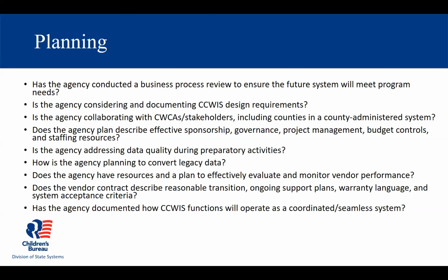You may, after reviewing the questions, decide you need to focus or prioritize or address only several of them. You may decide that you want to request TA on one of the issues. On the other hand, you may decide you want to address one of these issues, but that doesn't mean you have to request TA. You may determine that it's easier and more effective to handle it via an internal approach, such as assigning a task to one of your vendors, maybe hiring an IV&V specialist, or perhaps reassigning some of your own resources or bringing on additional resources to address an issue.